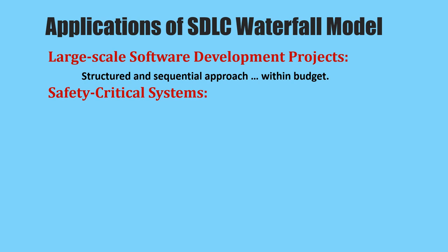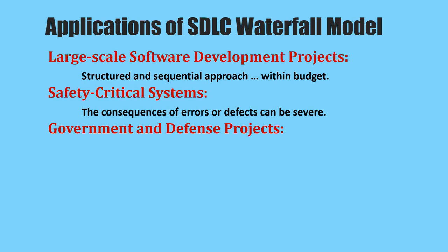Projects with well-defined requirements. The waterfall model is best suited for projects with well-defined requirements, as the sequential nature of the model requires a clear understanding of the project objective and scope. Projects with stable requirements. The waterfall model is also well suited for projects with stable requirements, as the linear nature of the model does not allow for changes to be made once a phase has been completed.